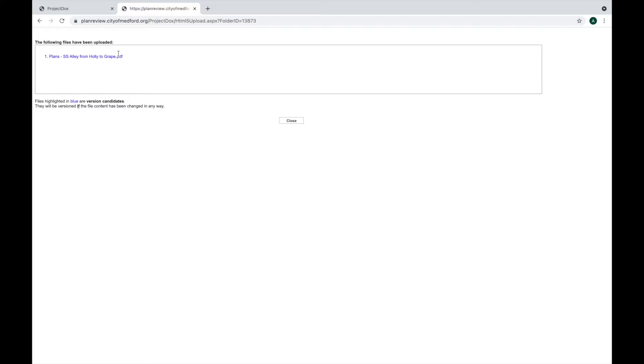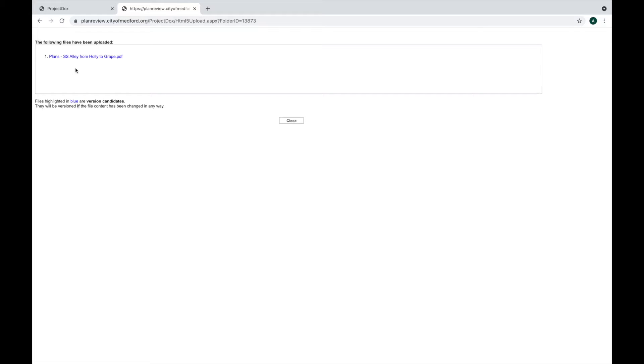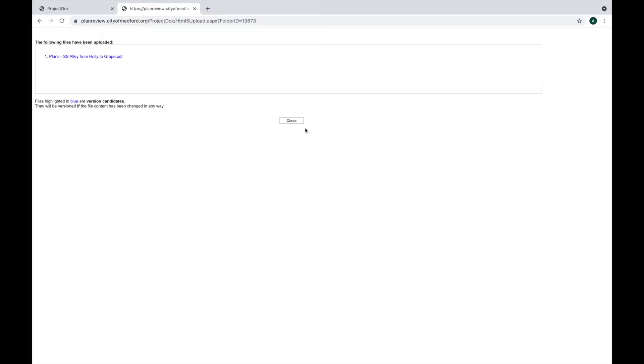This says the following files have been uploaded and files highlighted in blue are version candidates. That means that I successfully versioned over the existing plans with my revised plan set, because it's in blue. If additional text or maybe an underscore makes it so that it doesn't version and it's not shown in blue, you'll need to contact city staff and then they can remove that file, and you'll be able to try again to upload a version.